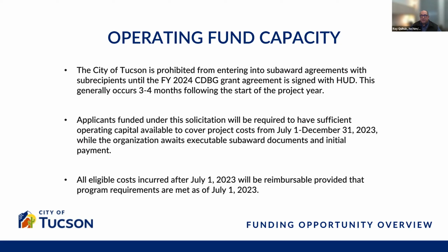This means that applicants funded under this solicitation will be required to have sufficient operating capital available to cover the costs from July 1 to December 31st, 2023, while we both wait for an executable subaward document and initial payment. All eligible costs incurred after July of 2023 will be reimbursable, provided that the program requirements are met as of July 1st.